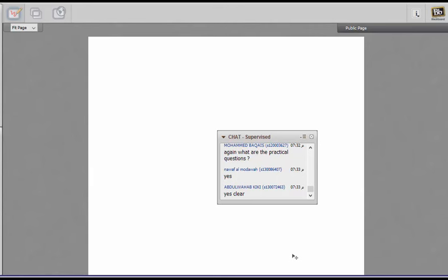These are some concepts which are at the end of chapter 4. Configuration control is the department of the project which maintains the current formal documents, current formal artifacts or deliverables of the project. Baseline is the current accepted version of any artifact that has been created during the project, like the design, the architecture, the code, the database. The current stable version is known as baseline.